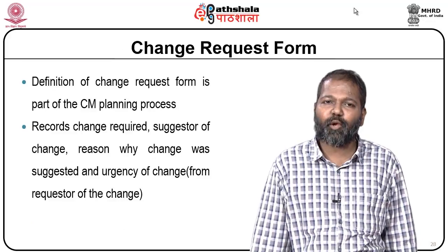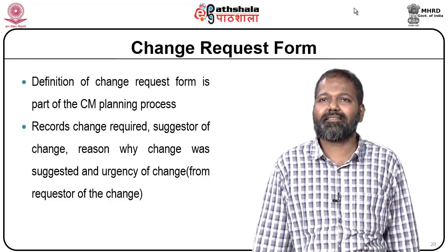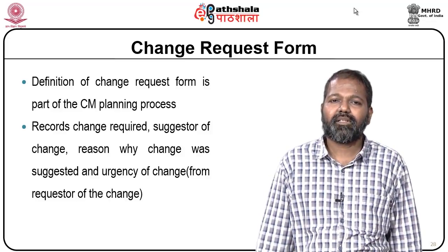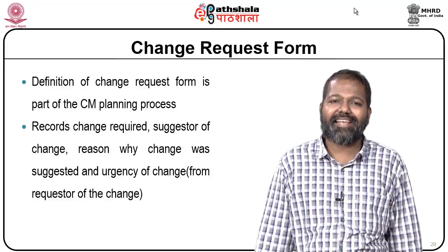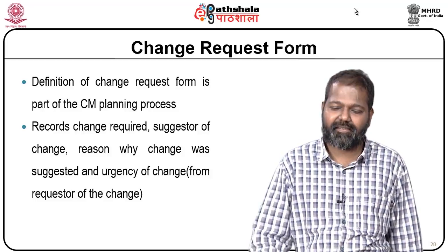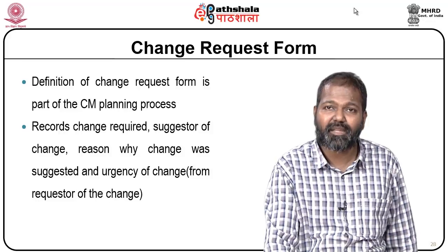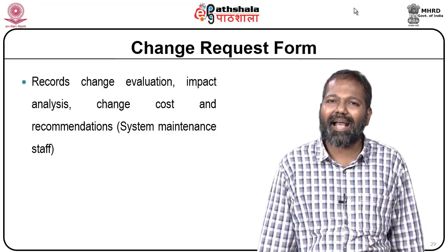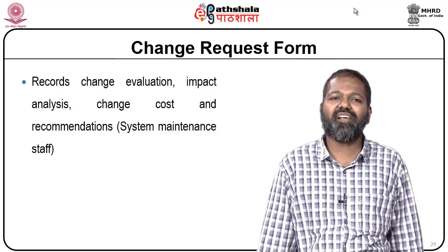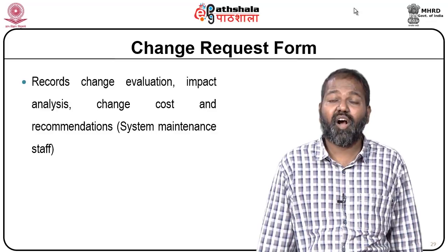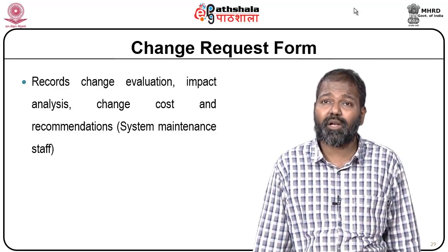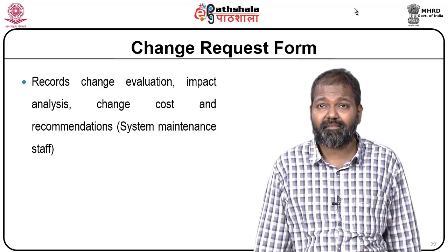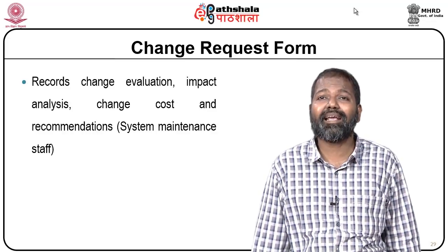We have a change request form in which the changes required are recorded, why the change is required, and the urgency of the change is also mentioned. It also records change evaluation, impact analysis, change cost, and recommendation. Cost is one factor that plays a major role here. When there is a change when you are in the testing phase, the cost involved will be high.